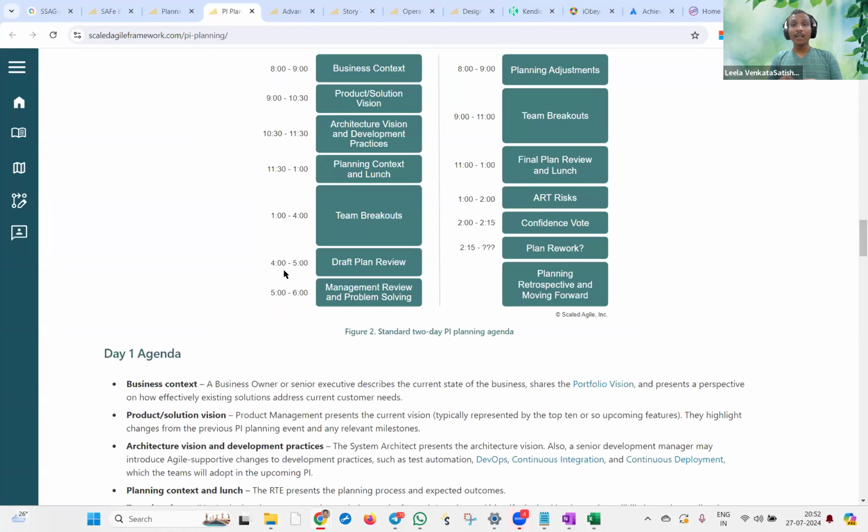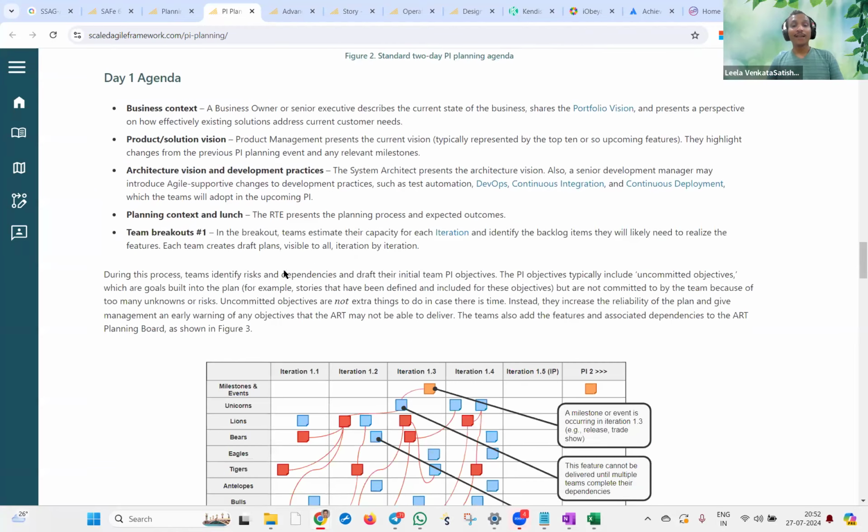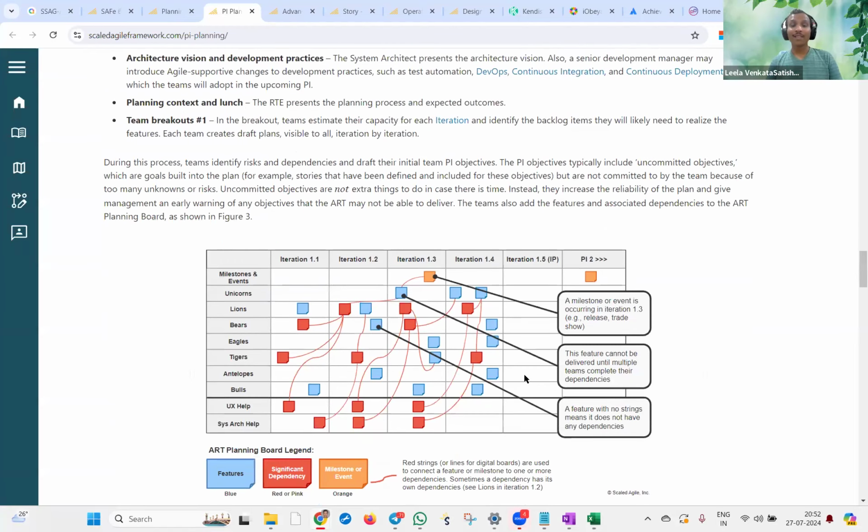So no need to go into detail like what's happening in sprint 1, what is the story estimate, who is working on which story. Not at all required. The whole focus is at the release train level, at which you talk about the feature level. That's the reason even on the program board, whatever is represented are the features, not the user stories.